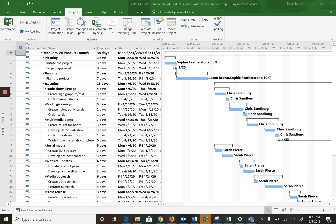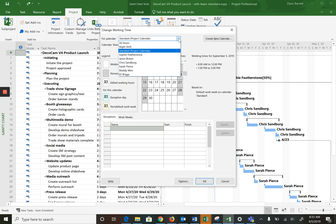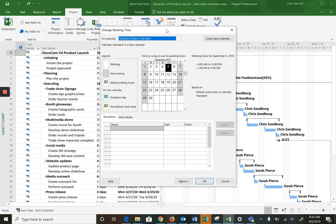If you click on Project > Change Working Time, it brings up the dialog box you need. Some of the more advanced features include different calendars you can associate with your project. We are using the standard now, which I just described. But there is a 24-hour calendar, a night shift calendar, and you can have calendars for specific people as well. That's beyond the scope here. The typical setup, as mentioned, is a five-day work week, eight hours per day, and it even describes the hours worked. A lot of project schedules don't really worry about the hours, but it's there if you need it.